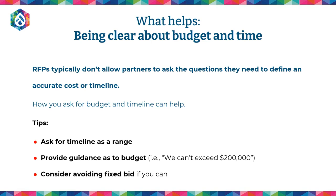It's very helpful if you can give them a little bit of flexibility, like we talked about with John, talk about the solution, because cost and time is also part of the solution. So rather than telling them this is the timeline, although that is an option at times, especially if the timeline is a little bit more flexible in nature. If right now it's April 2022, if you say we'd like to launch before April 2023, that's probably enough time to do something and to give people enough flexibility.